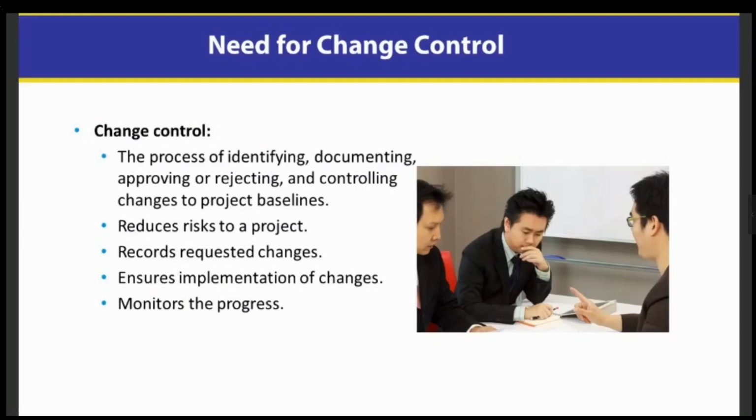So what do you think we would want to know if somebody wants to make a change to your project? What would you want to know about that? Well, the specifics of the change and the elements of the project that are impacted by the change. You got it. So we would want to know what requirements are associated with that particular change. How does it affect other requirements or other things that we're doing? What's the cost of that? What's the relevance? Why would you want to make this? How does it relate to the business, or how is it going to help us on this project? How long is it going to take? How many people will be involved? Those are some different things that I would want documented associated with the change.